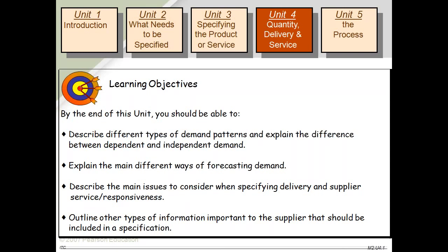And when should it be delivered? If I need an item after 10 days, do you need the delivery now? That means for the next 9 days, the goods are going to lie somewhere in the warehouse, occupying space, and space means cost. So the next question also comes on the service side. What type of service do we need from the supplier?